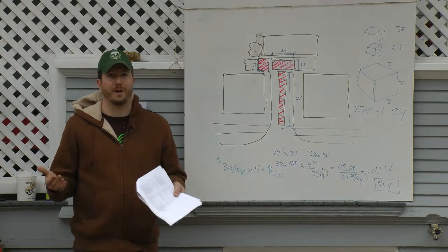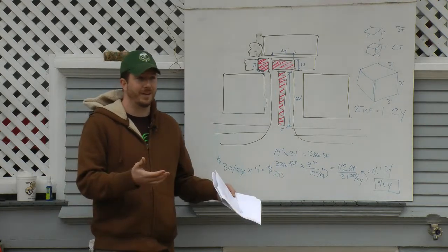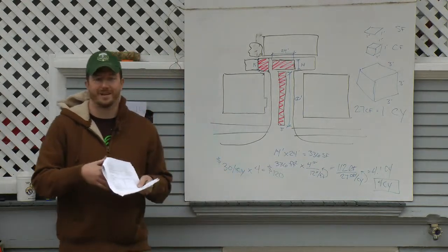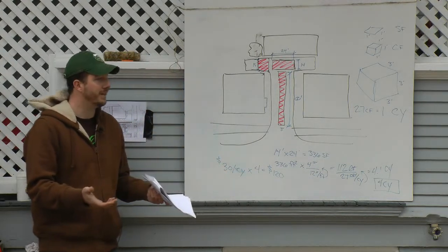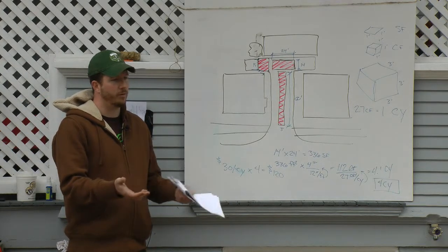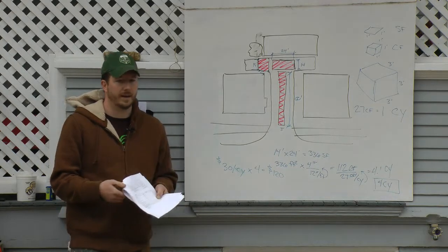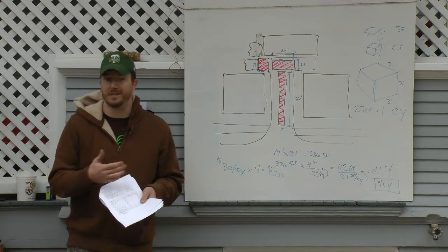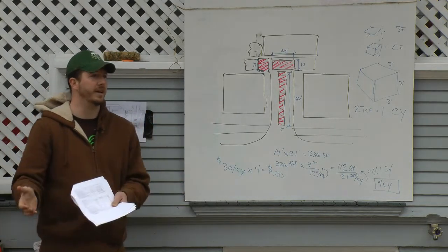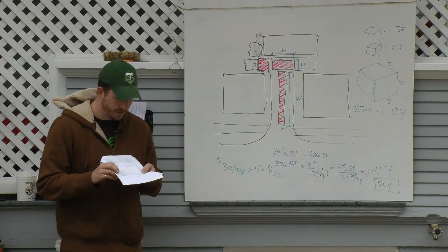We do a lot of work for hospitals in town, for instance, my company, and the hospital has a budget for the job. They always have their budget, and they always add 10% because they know that you open up a wall, you might find something you didn't expect. And the same thing here as well. You never know what we might find down below the surface of the pavement, or you might price something up and then see a cost increase if you wait a while between doing your estimate and doing the actual work. So I think for us, 5% seemed like a good contingency fund.